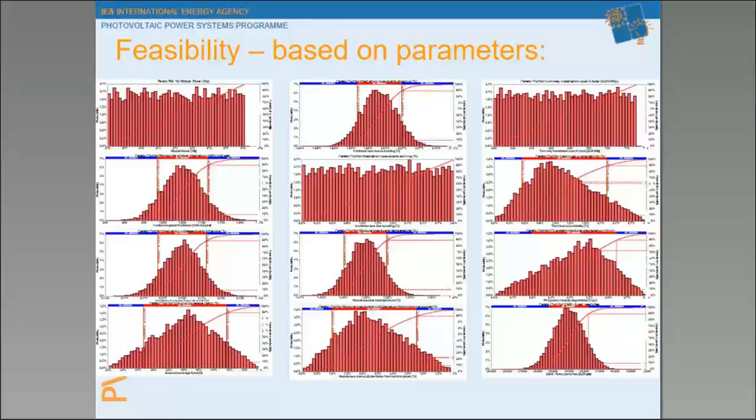We therefore now run our yield and profit analysis equations 10,000 times, using the parameters we have carefully calculated using the best practices we concluded in our report, Technical Assumptions Used in PV Financial Models. Here we see each of our 12 variables as the output from a Monte Carlo simulation. We no longer have a single value, we have a distribution. We see here quite distinctly the 3 types of statistical distributions we had defined, the uniform, normal, and triangular.